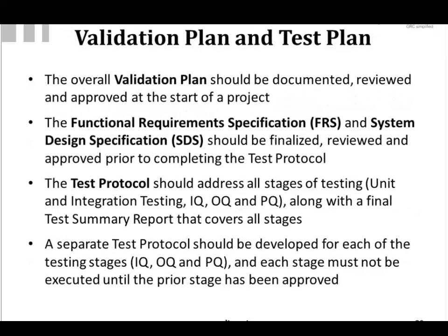Now, the overall validation plan should be documented, and this is at the start of the project, and it should be reviewed and approved. The FRS and SDS should also be finalized, reviewed, and approved prior to completing your test protocol. Your test protocol should address every stage: unit and integration testing, IQ, OQ, and PQ.